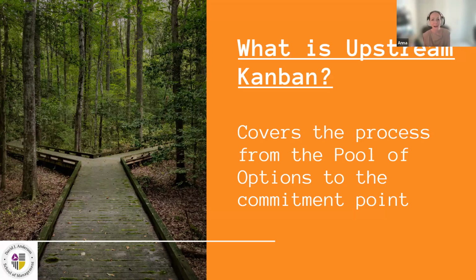Recently in the class, I had quite a long discussion about what Upstream Kanban is with some students that didn't have any previous Kanban experience or were not used to Kanban terminology. And what we also figured out, finding the common ground, is that you can define the commitment point by, for example, a definition of ready. So this moment in your process where you decide, okay, this item is ready to go and we can start working on it, this will be your commitment point. So this is a very, very general definition of Upstream Kanban.